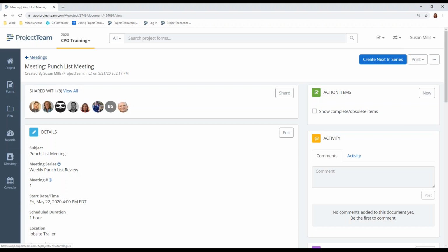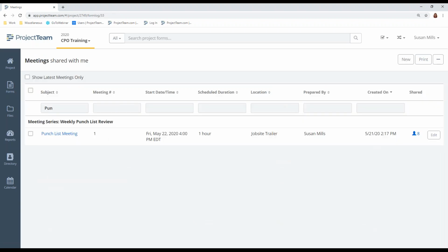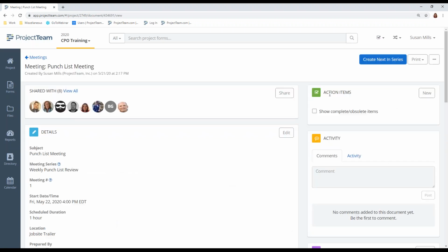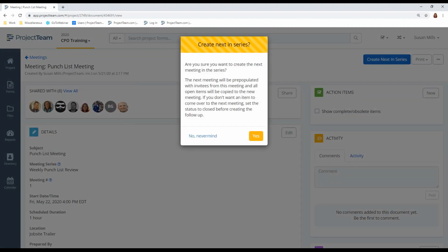So meetings are done. This meeting is done for this week. Time to host the next week's meeting. So I'm going to click Punch List Meeting, and I'll click Create Next in the series. It's going to bring over everything for me. All the open items will come over. If I've closed an item, it does not come over into this meeting.